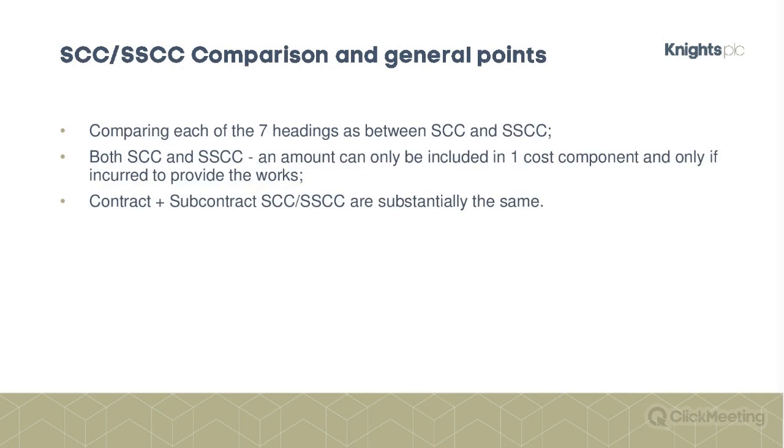So an example of that would be if you were using, say, plant and machinery, so you had a crane, you can claim the cost of the driver, but you can only claim it once. So you can only claim it either under plant and machinery or under people. Sorry, crane drivers. It sort of stands to reason, but obviously it's written in there just to be clear.